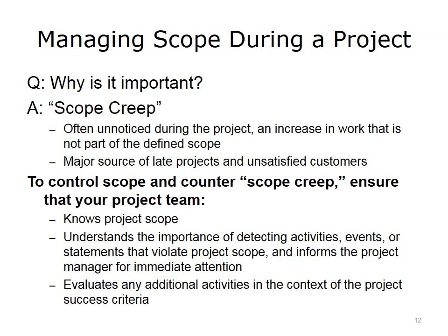In healthcare IT, clinicians may say things like, "At this point, we need an alert to the prescriber that a lab value is out of range or is a panic value." Or they might say, "We need to have a drug-to-drug alert pop up at this particular point." These could be examples of scope creep because you may not have those lab values in your system, or you may not have drug-to-drug allergy information. Be sure that everyone in your group understands the clearly defined process for managing scope to deal with changes like these.